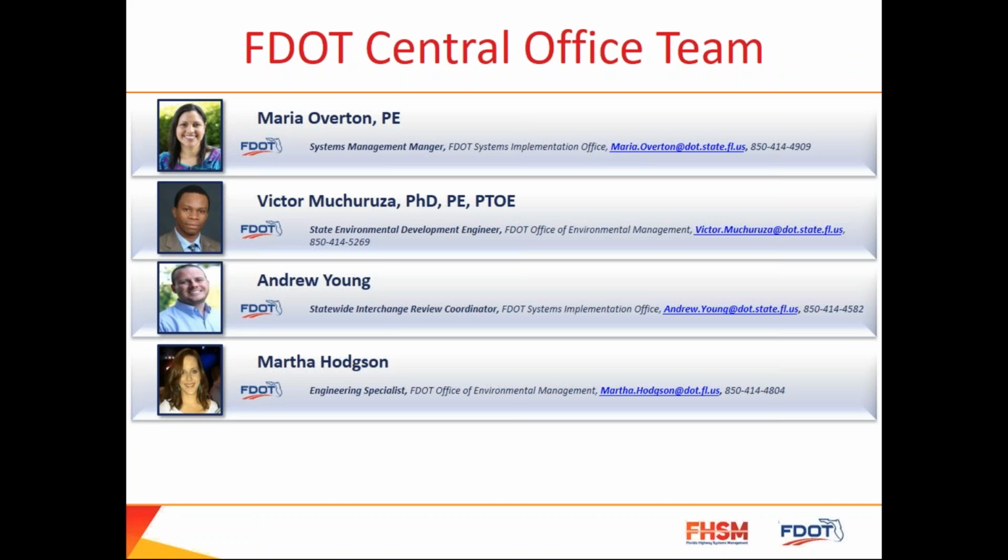Does the letter to be submitted to Federal Highway for affirmative action impact the design phase? Can we start the design phase without that letter? Yes, you can start the design phase without the letter because the NEPA approval is the federal action authorizing the design phase. So yes, you can proceed with design while FHWA is working on the letter. And hopefully we expect that it's going to be quicker. It's not going to be like 6 months back and forth.